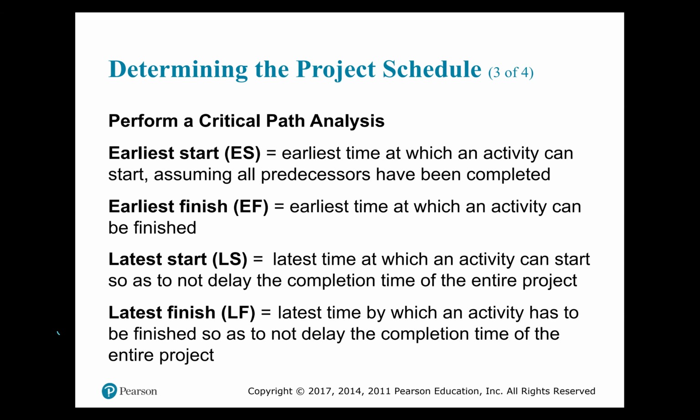The late finish time for an activity is the latest time by which an activity has to be finished so as to not delay the completion time of the entire project. So they come in pairs. They're Bobbsey twins. When you talk about earliest start time, you must think about earliest finish time also. And when you talk about late start or latest start time, you must also be thinking about the latest finish time.